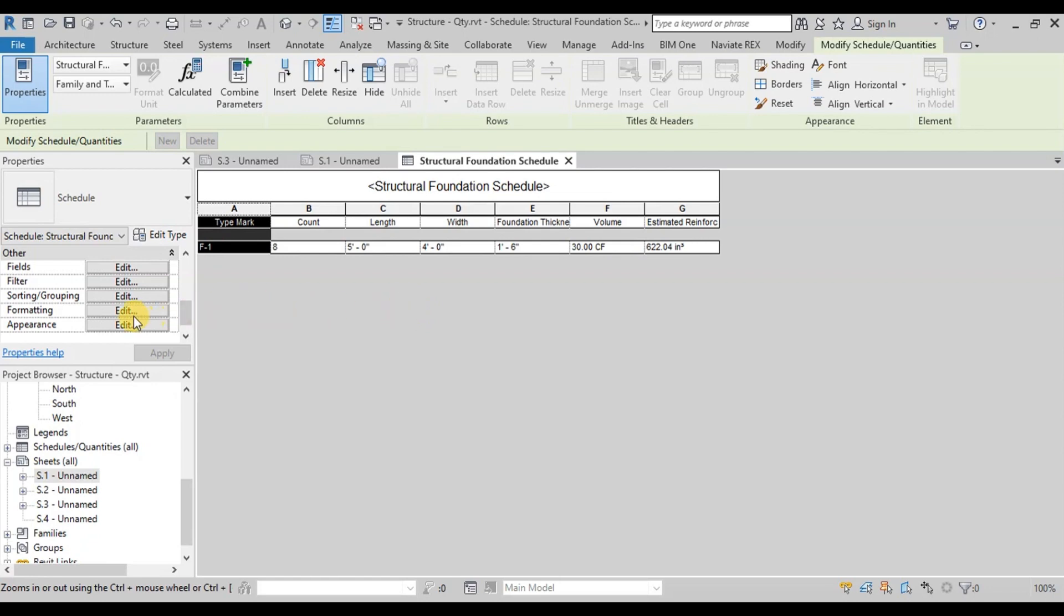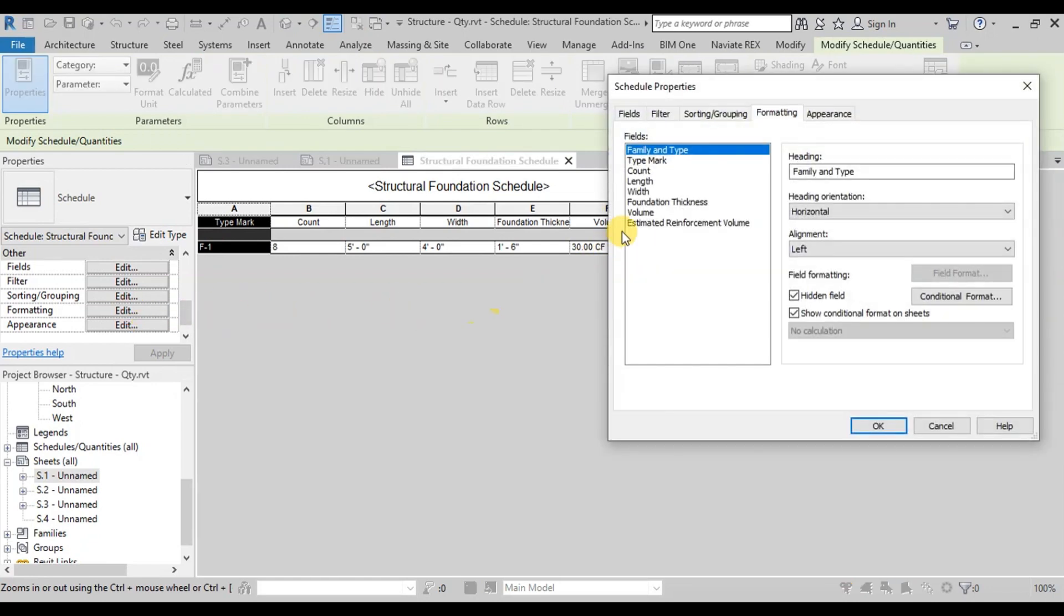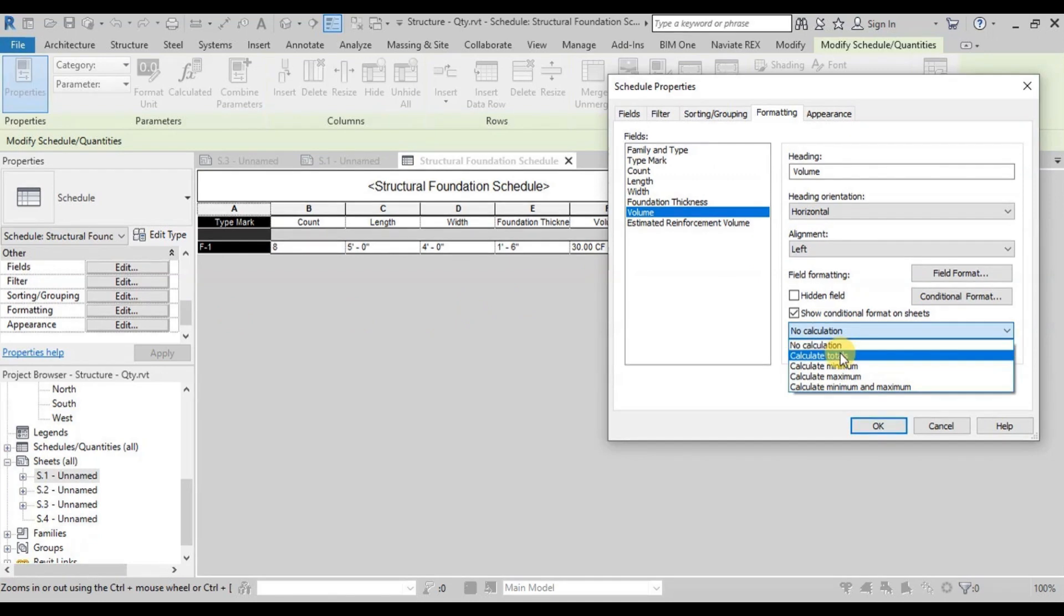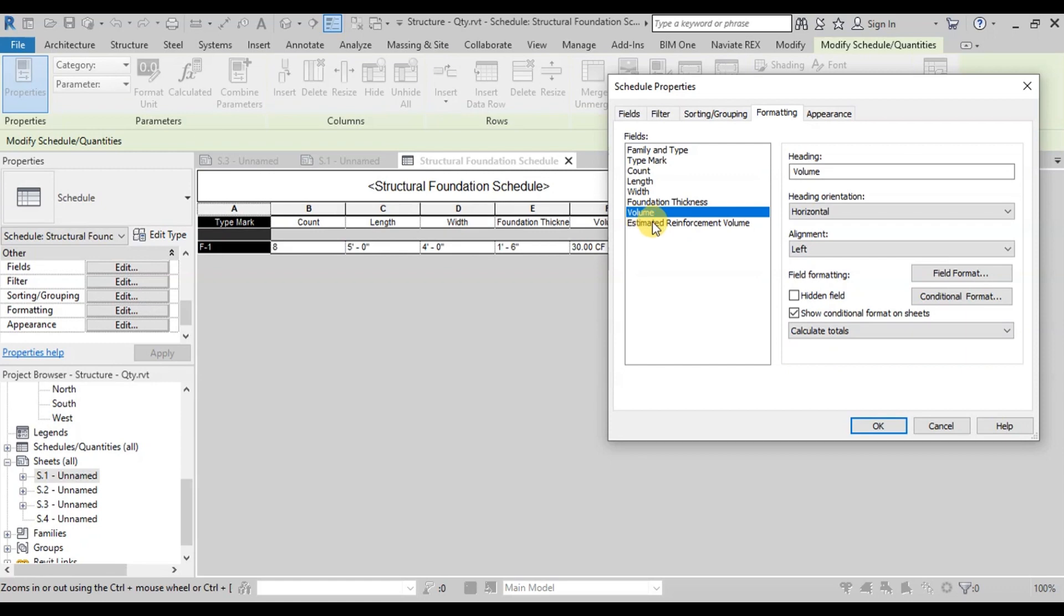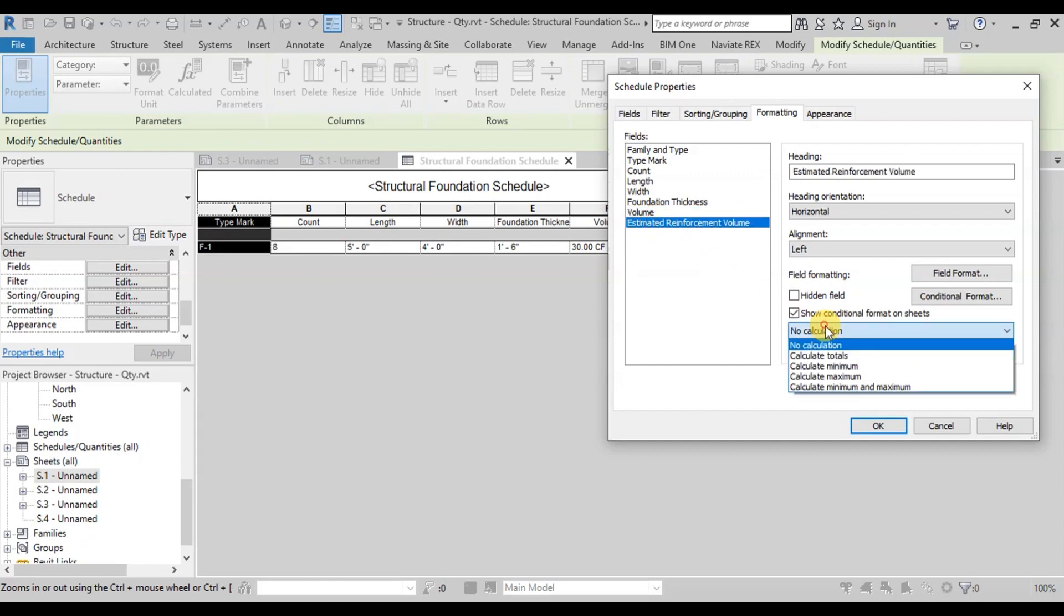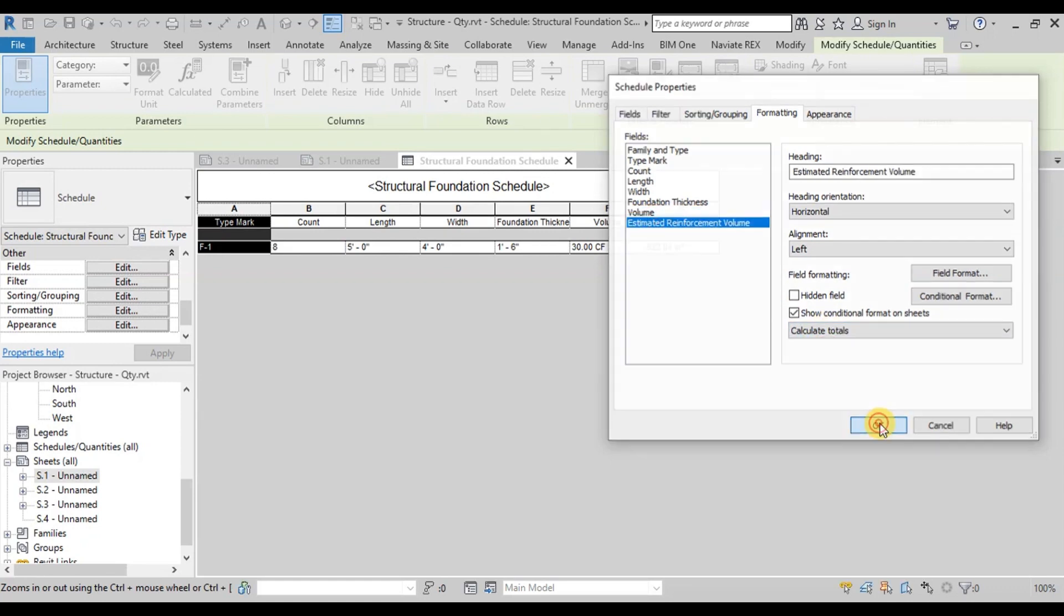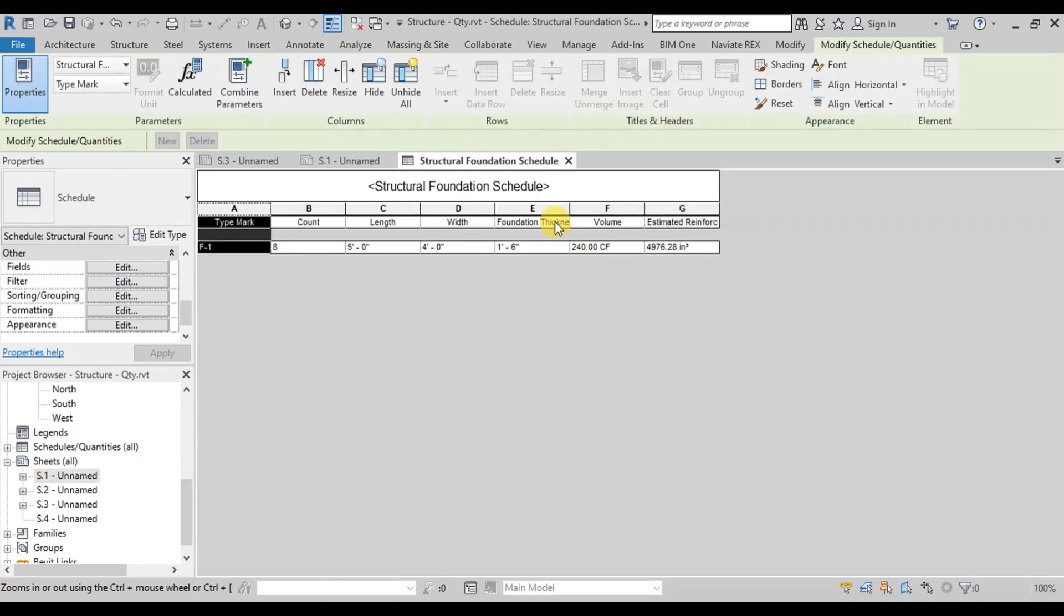Click on Formatting. Select Volume field. Change this field formatting to calculate totals. Similarly change Estimated Reinforcement Volume field. Now we can see that total concrete and steel volume are displayed in the table.